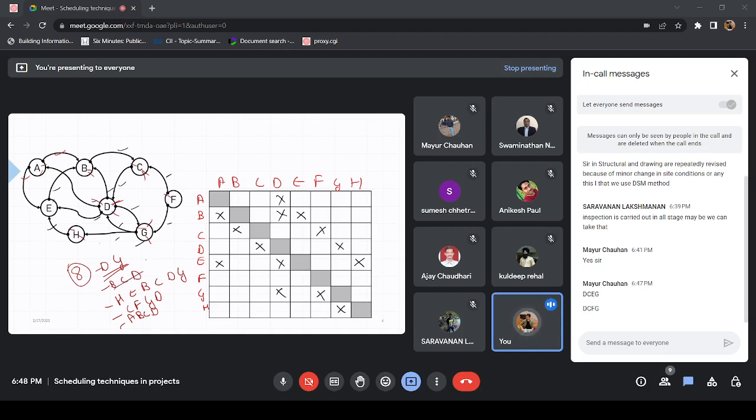In numericals you would be asked, so DG will be counting as 2, BCD 3, right? If you are asked which is the biggest cycle, the biggest cycle here we found is HEBCDG, right? 1, 2, 3, 4, 5, 6, of 6. So these are potential questions that were also there in assignments.